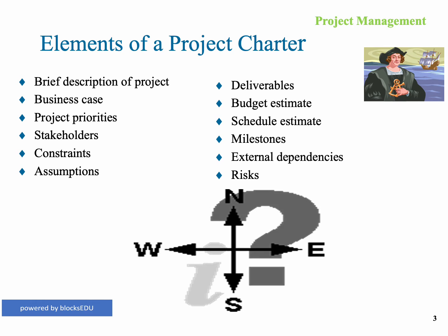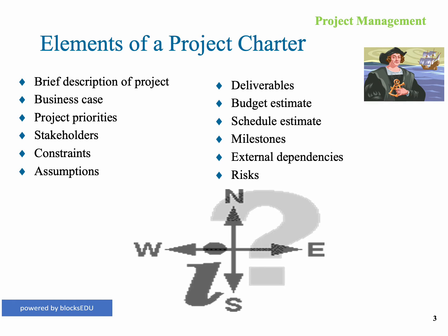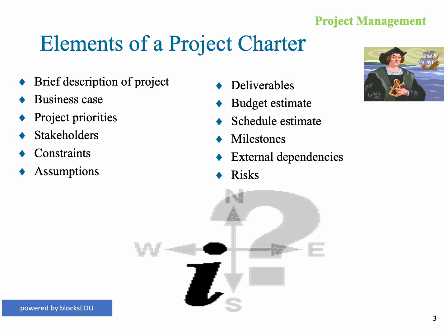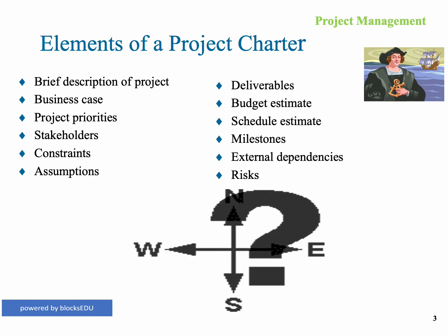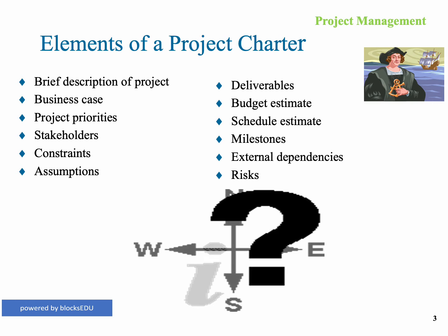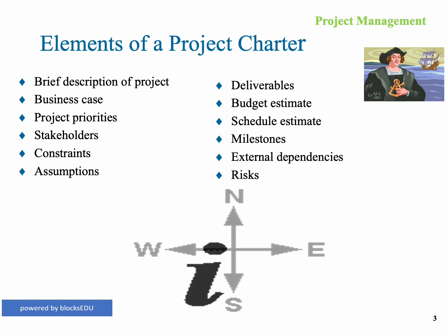The project charter is a very important document within the life cycle of the project, of course. Often the information that's contained in the project charter comes from previous documents that are created, being the business case, the project statement, the priorities, some assumptions, things like that. But the project charter should contain a brief description of the project. It should have a business case, things from the business case, like the statement of the opportunity or the problem, the expected benefit, the solution, and some cost estimates that go along with that.